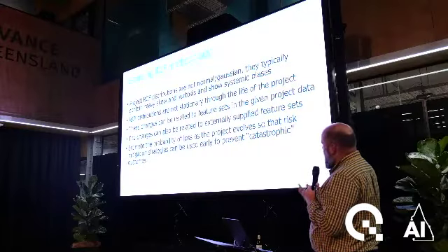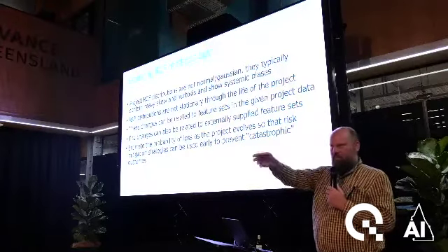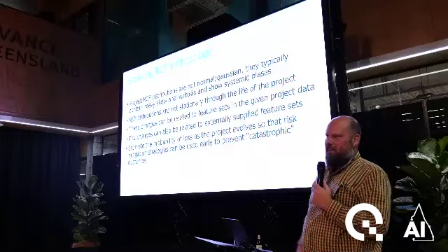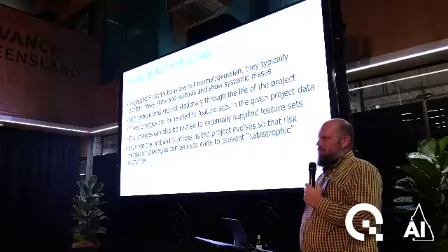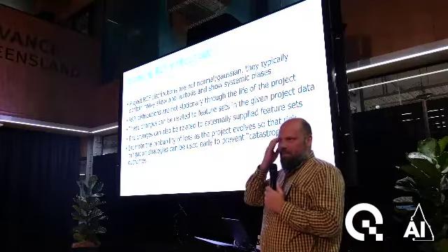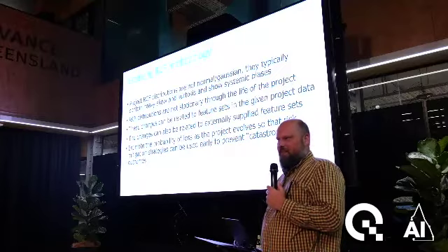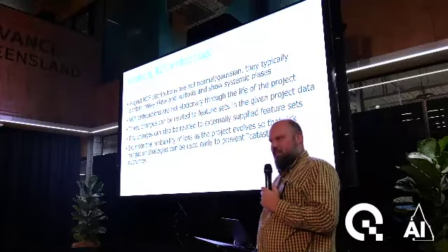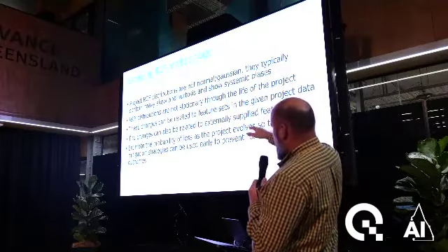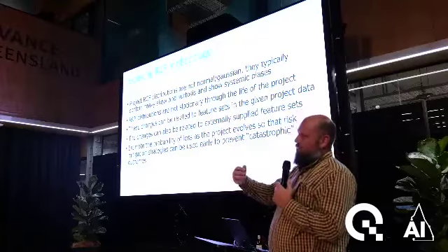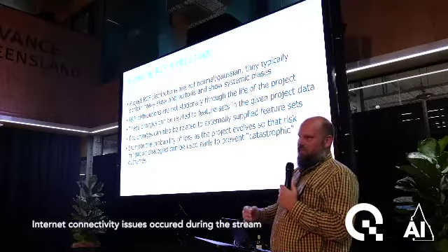Now, there are other issues too. For example, you're talking about wanting to see how they're changing through time or getting better. But some things they can't control, or may not be thinking about controlling, like movements in prices. Recently there's a problem in the construction industry that steel prices have gone up, and that's a stochastic parameter. They're not going to know exactly what the steel price is in a year's time. So you can even have cases where instead of just looking at the historical data, you'd like to get external data that's not related to the company and include that in the fit.